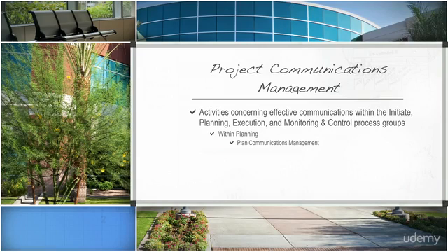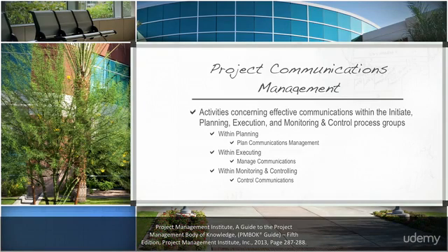Developing a communication plan occurs within the planning process group in conjunction with the overall project plan. It's considered to be one of the subsidiary project plans. Managed communications occurs within the executing process group, and control communications occurs within the monitoring and controlling process group. It should be noted that distributing project information, reporting project performance, and productivity processes are all aligned to the monitor